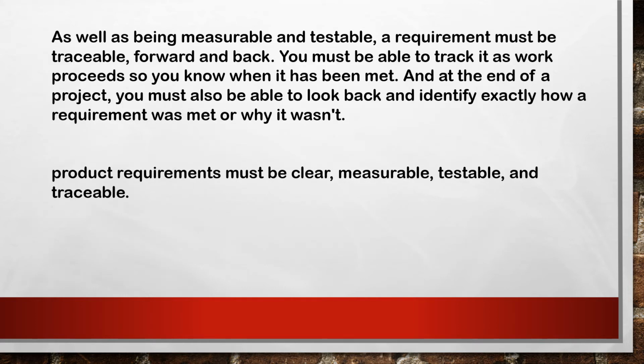As well as being measurable and testable, our requirements must be traceable forward and back. You must be able to track the work as it proceeds, so you know what has been met at the end of the project. You must also be able to look back and identify exactly how a requirement was met or why it wasn't.